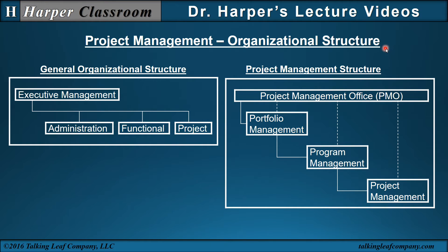The project management organizational structure is important to know how effective a project can be and how to conduct projects. The general organizational structure has executive management, administration, functional areas or line managers, and then projects. In the project management structure, you can have a project management office — the PMO — portfolio management, program management underneath the portfolio, and then project management underneath the program. A number of projects could define a program, and a number of programs could define a portfolio, all coordinated within the PMO.